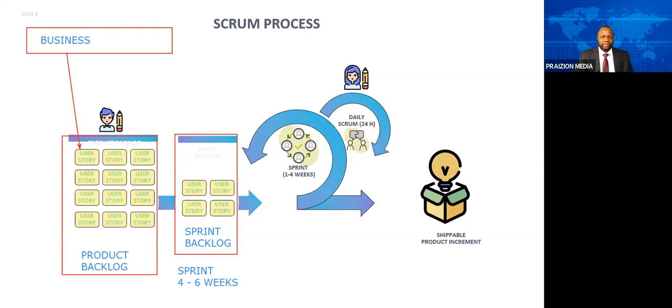We should be asking the question, does this meet the needs? What can we do better? What did we mess up in this sprint that we can do next? And that's why we have a second meeting called a retrospective. And in the retrospective, we focus more on what we did wrong and what we can do right. In the sprint review, we're really just demoing the product.